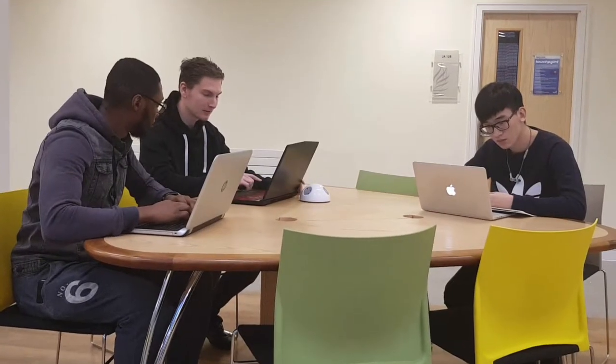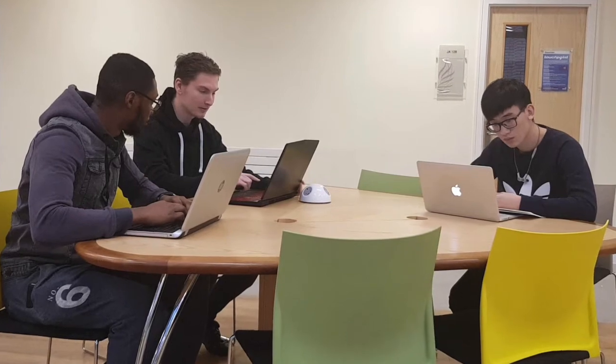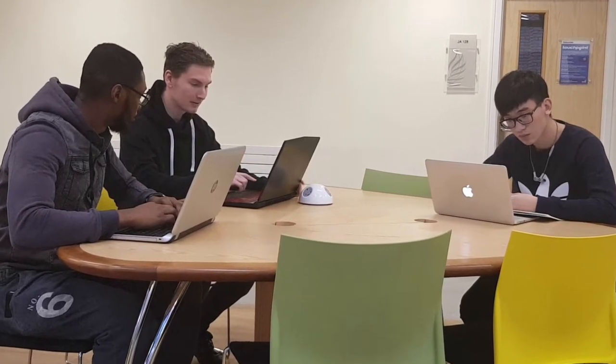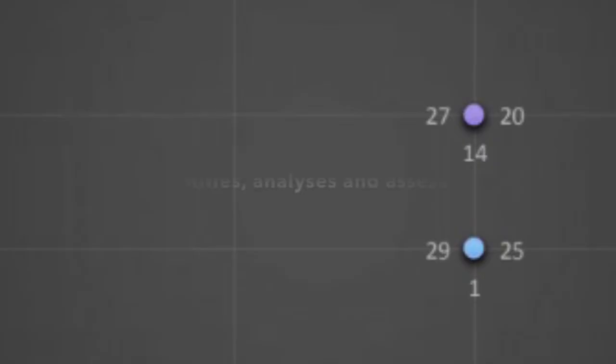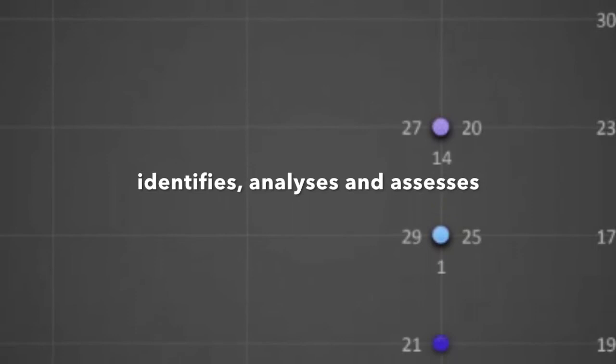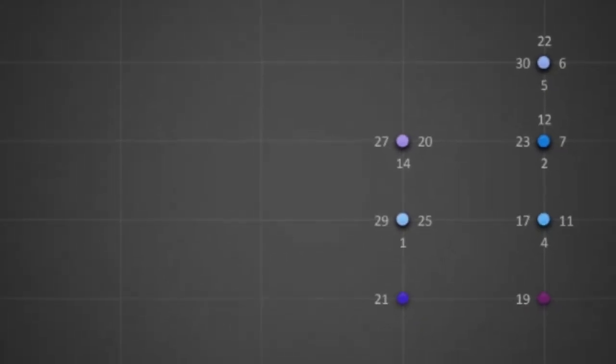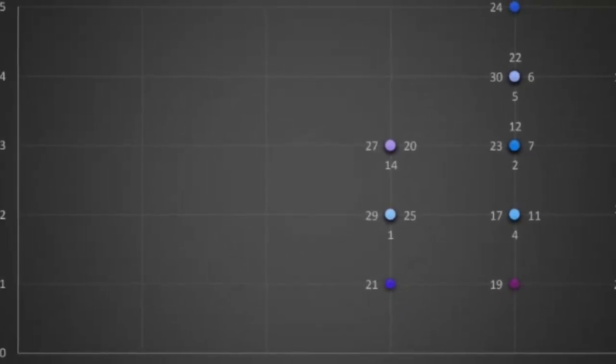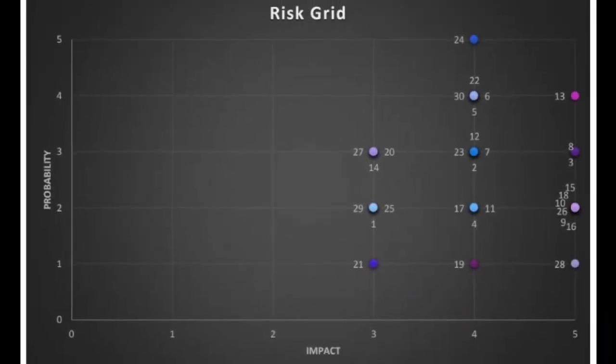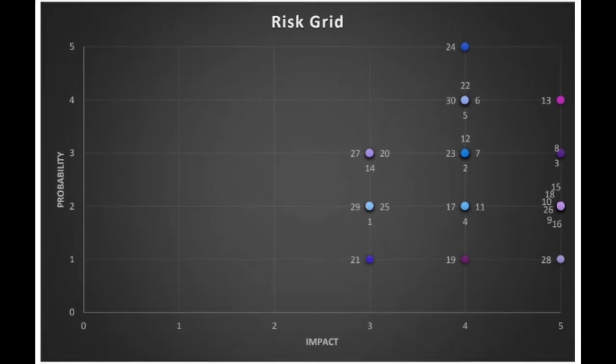The project team developed a project risk analysis and management document which identifies, analyzes, and assesses the probability, impact, and importance of the project risk and also indicates risk ownership.